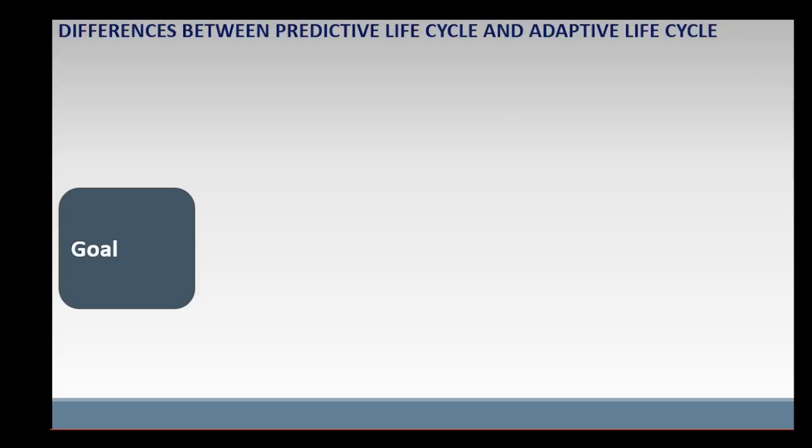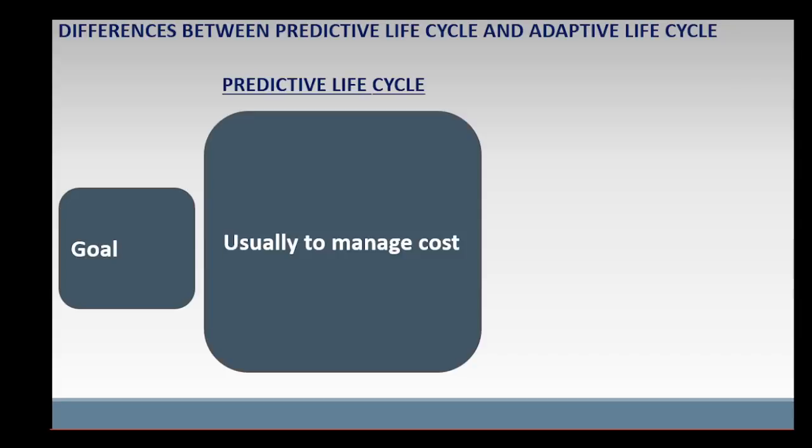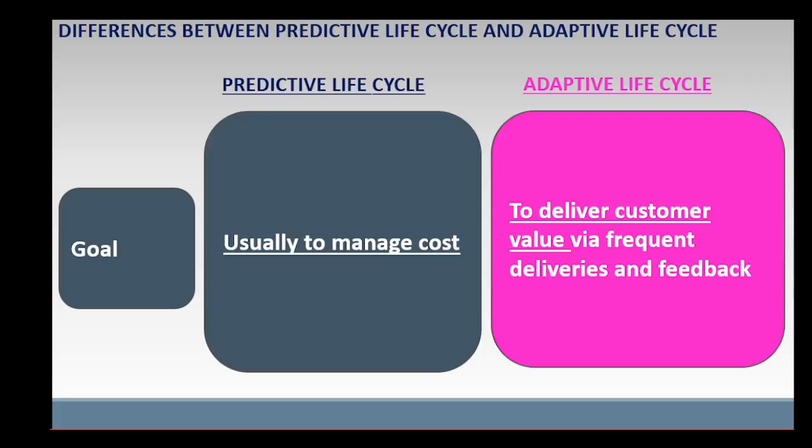In terms of goal, in predictive life cycle, the goal is usually to manage cost. In adaptive life cycle, the goal is to deliver customer value via frequent deliveries and feedback.